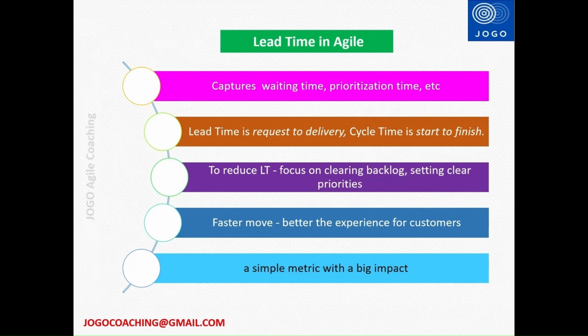Hope this is clear. To reduce the lead time, we should focus on clearing the backlog clutter, setting clear priorities, improving flow efficiency in the delivery, and reducing the handoff delays across the teams. The faster you can move items from requested to done, the better the experience for your customers. So that is lead time in Agile, a simple metric with a big impact for the customers.